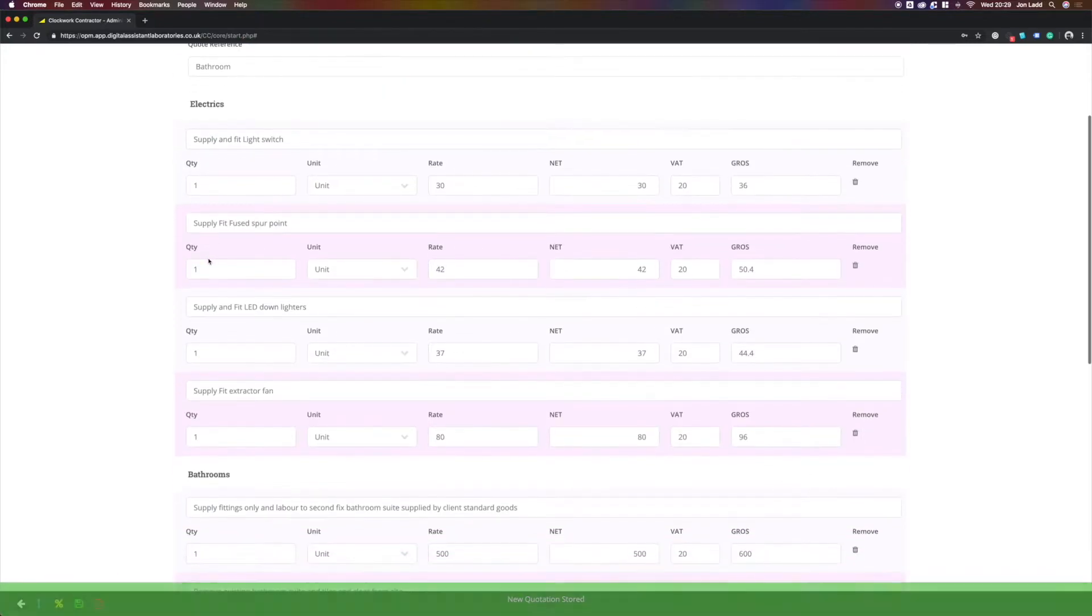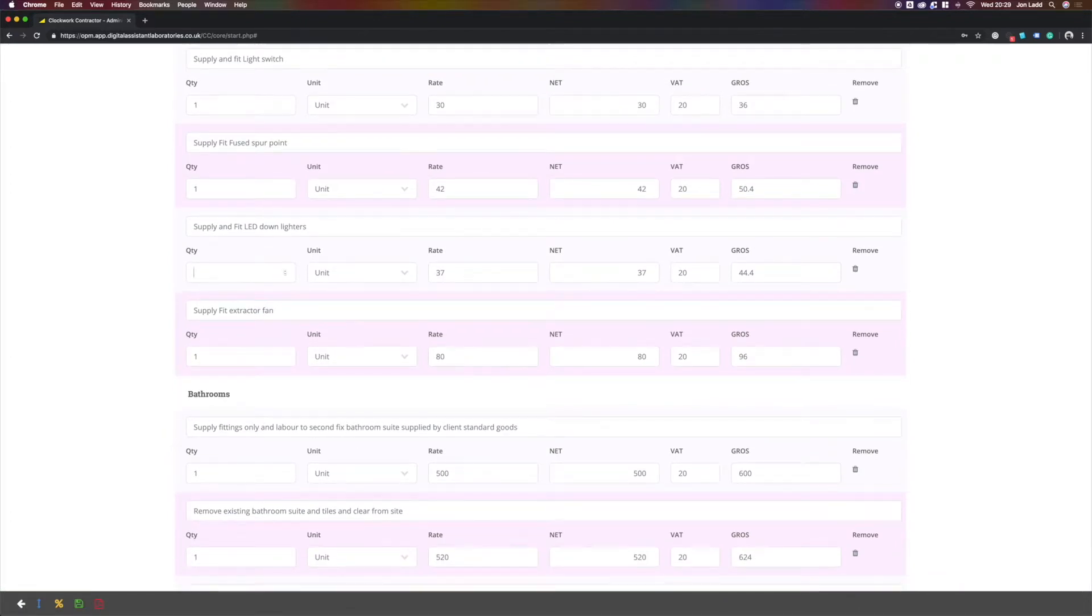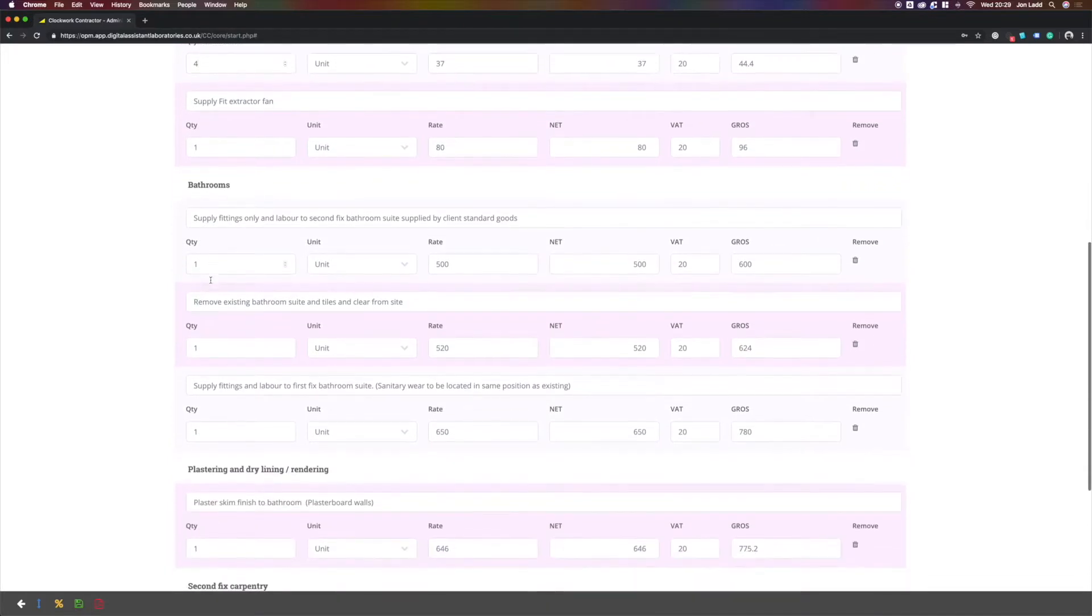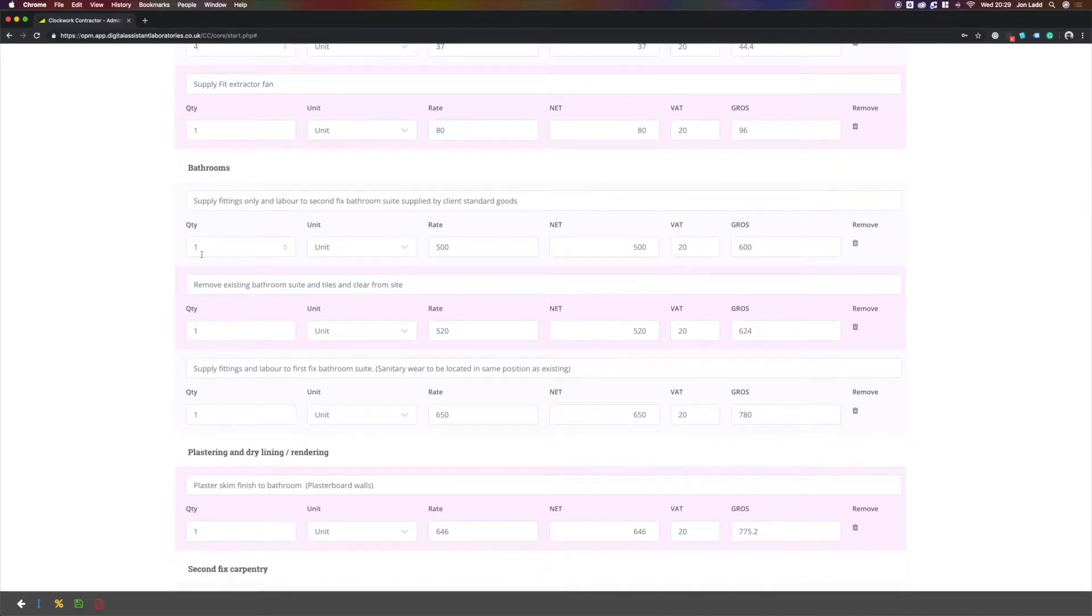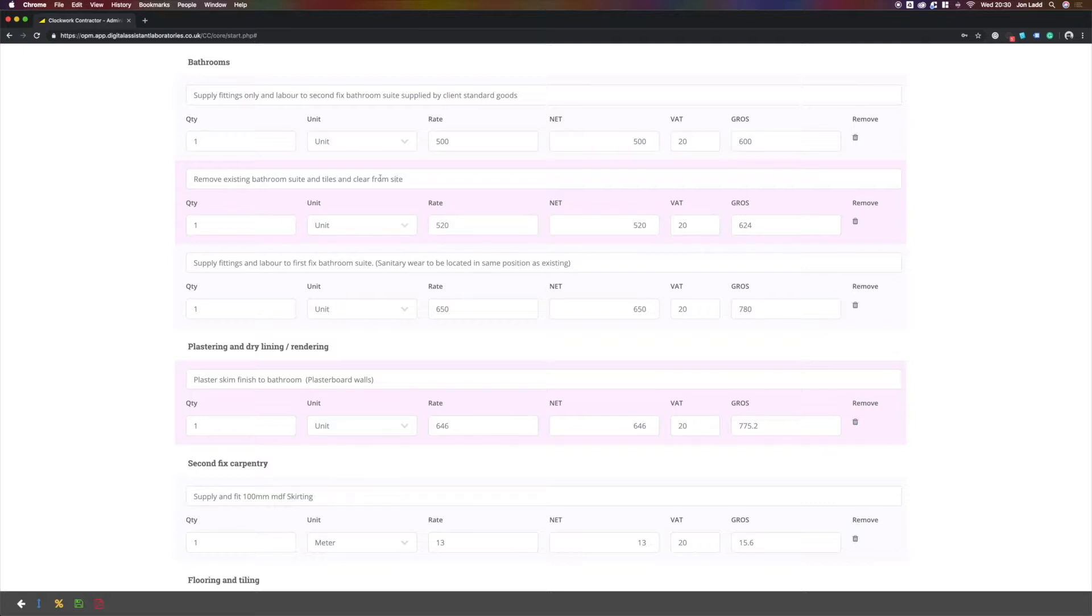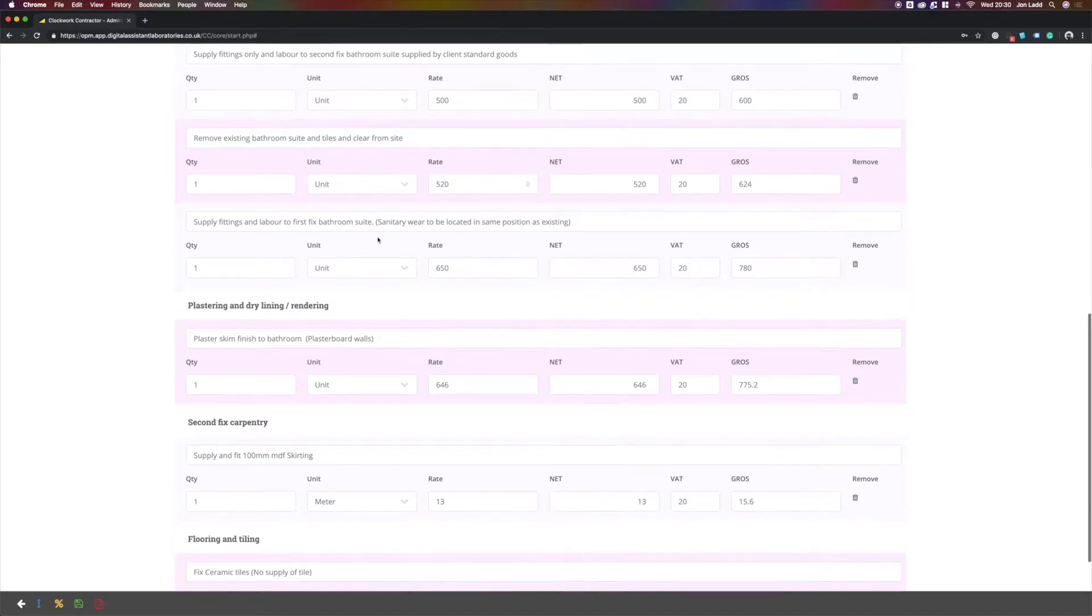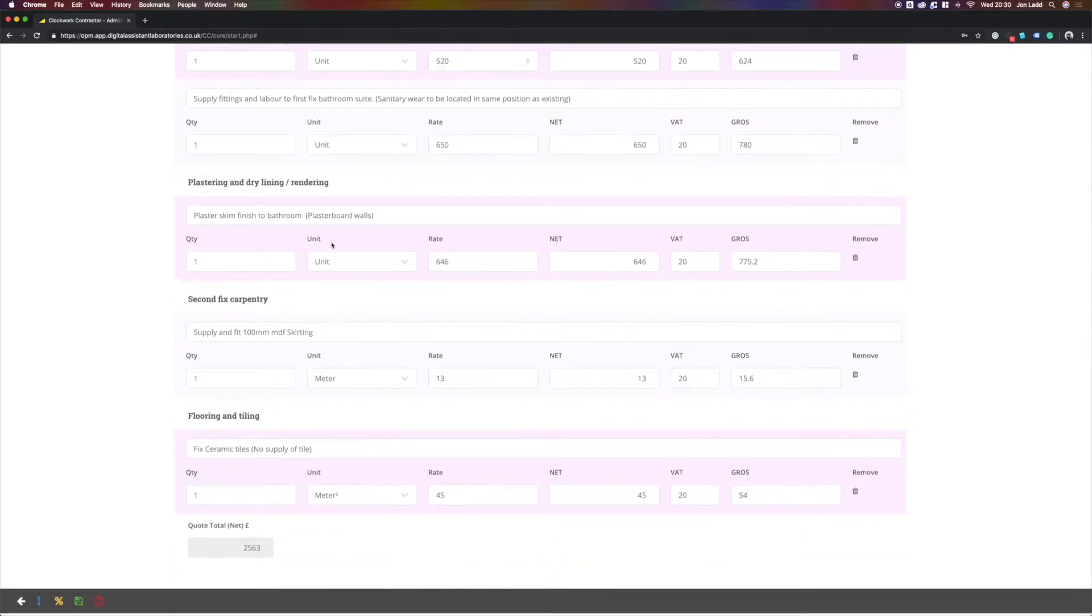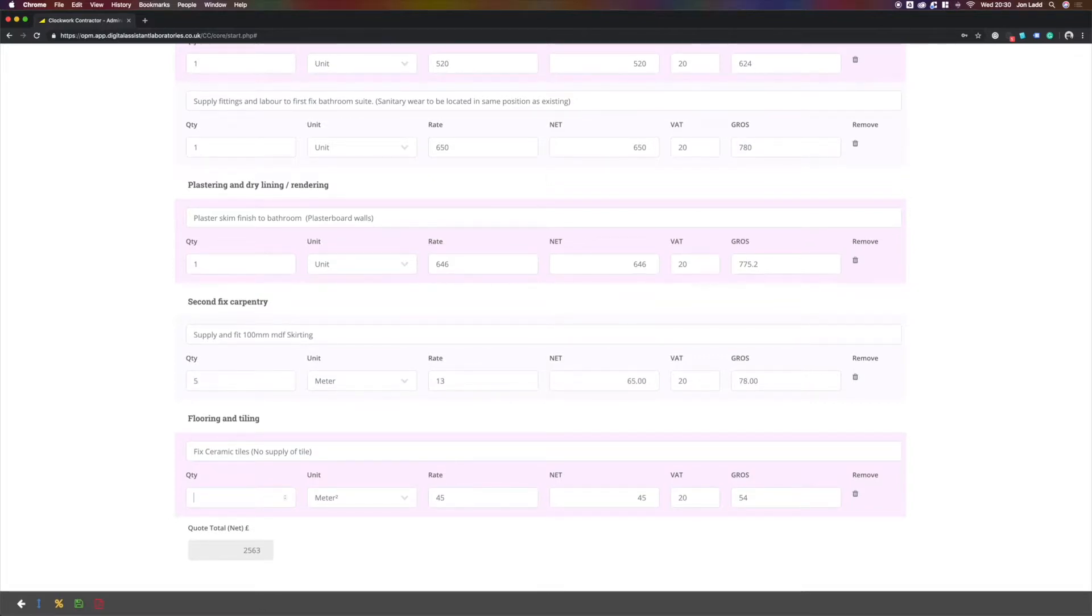Here we enter our quantities, four down lighters, one extractor fan, we are only doing one bathroom, a second fix, remove, and here we have our cost built in to remove the bathroom suite and clear it from site. So a skip would be included within this cost. At any point, you can edit this text and also edit the rate you are charging. We've measured up five meters of skirting for the bathroom and the client has requested eight square meters to be tiled.